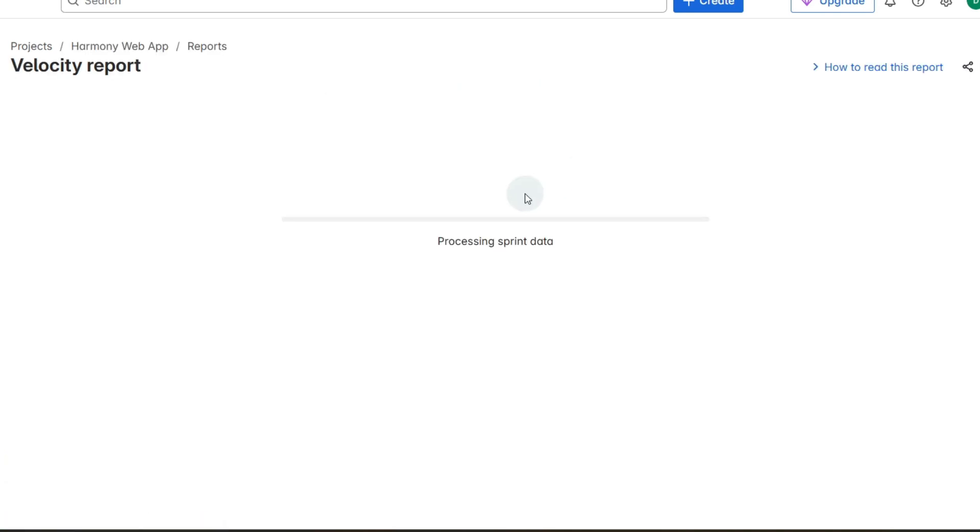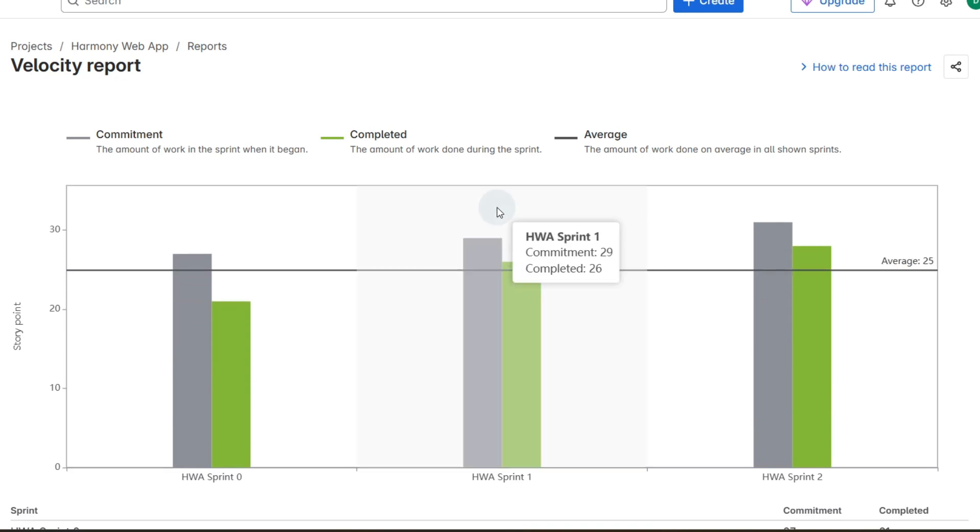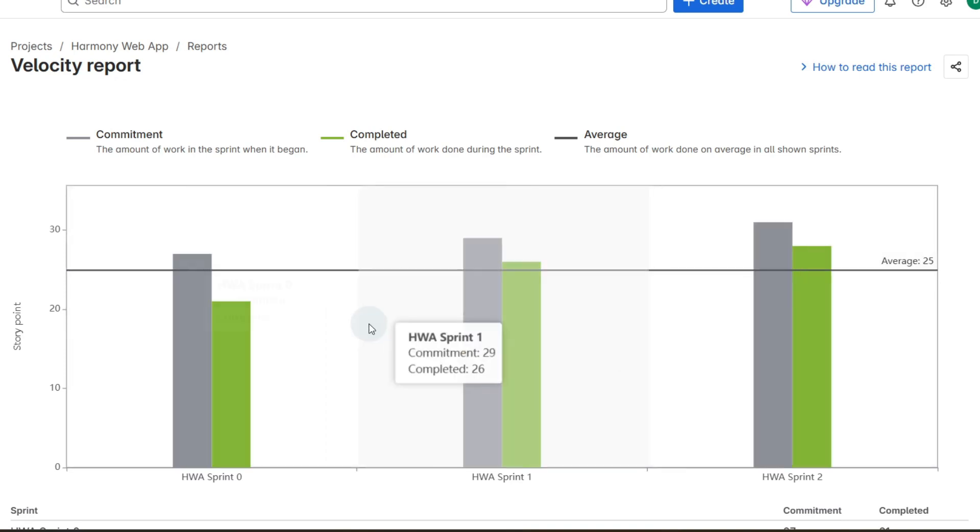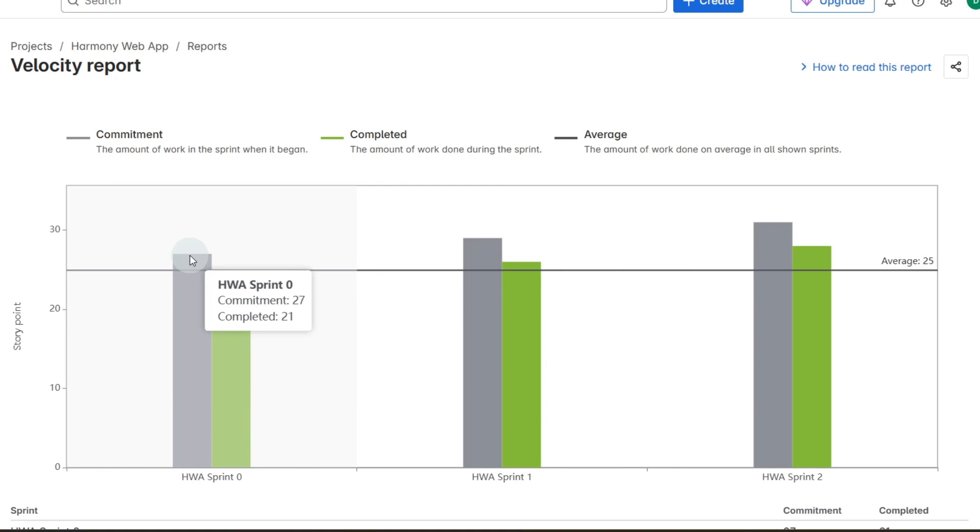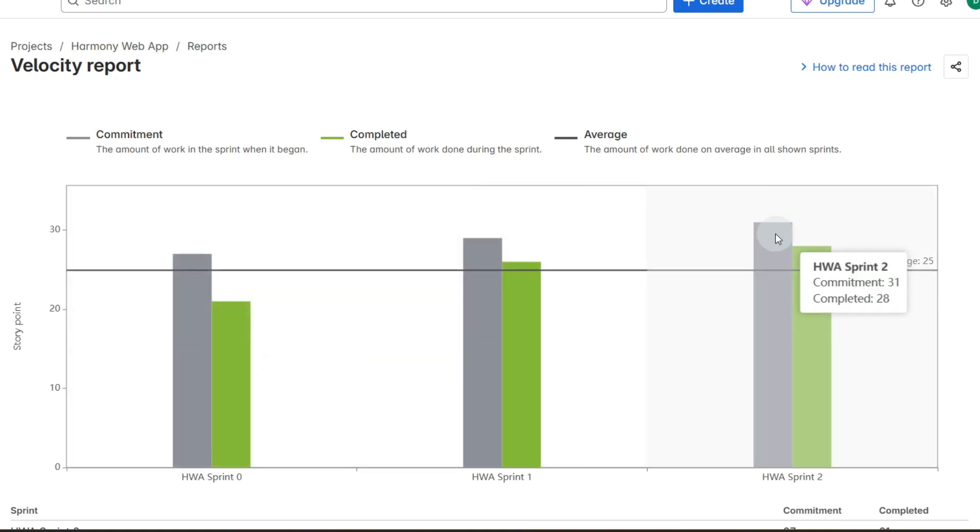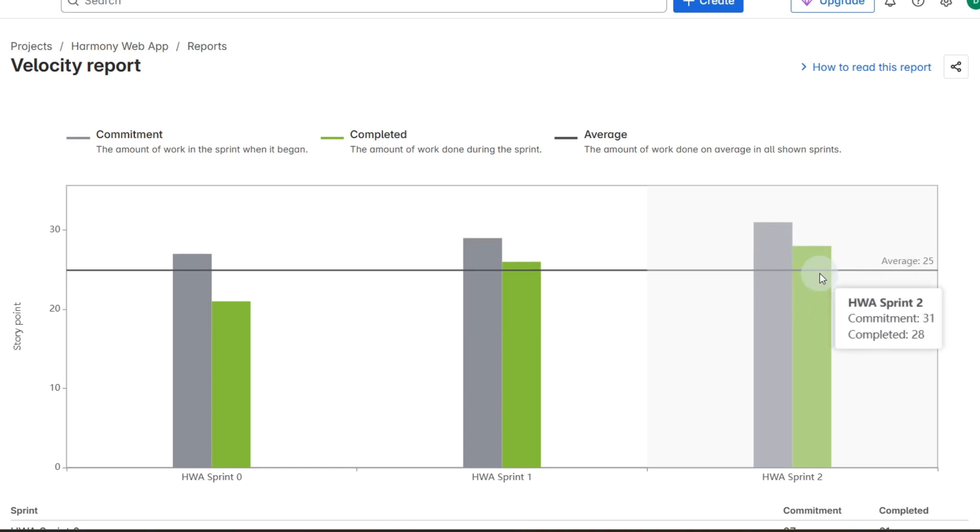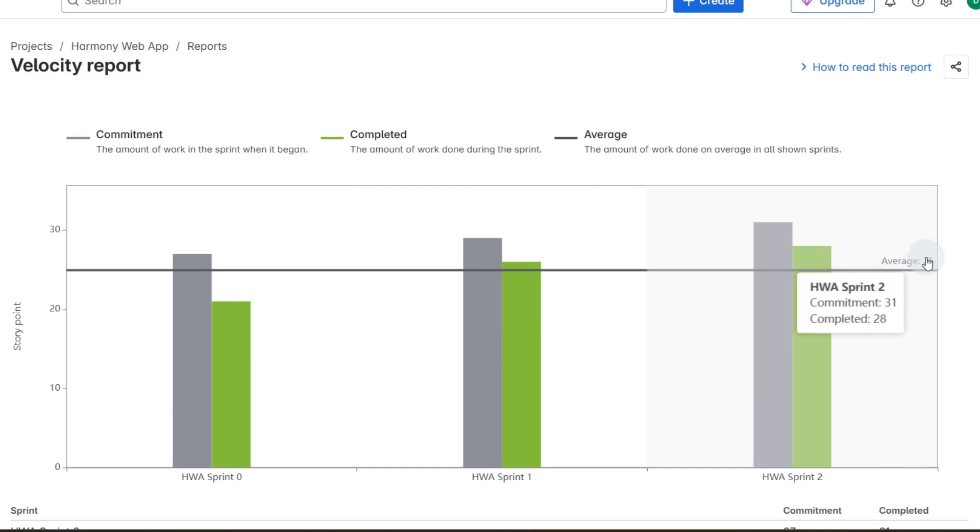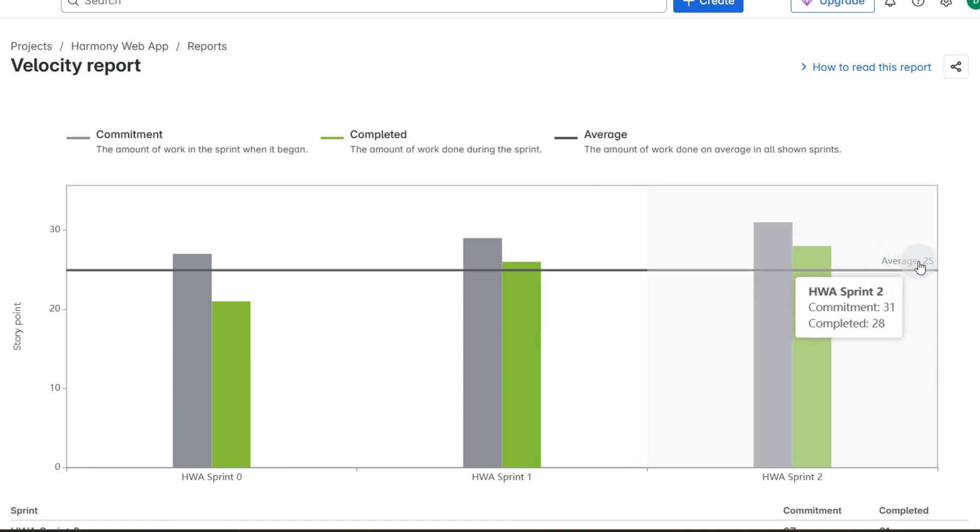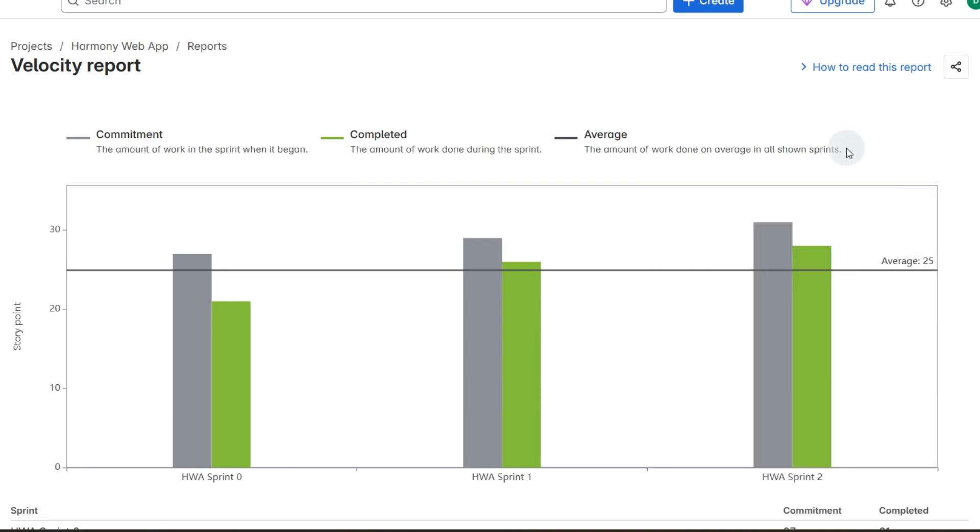This one's really important when we're running a scrum team, and as you can see because we've completed three sprints we had committed to 27 points and completed 21, and as you can see the next one we committed 31 and completed 28, and now we have an average so around 25 user story points. We could keep our sprints to around 25 user story points to maintain a sustainable pace within the team.